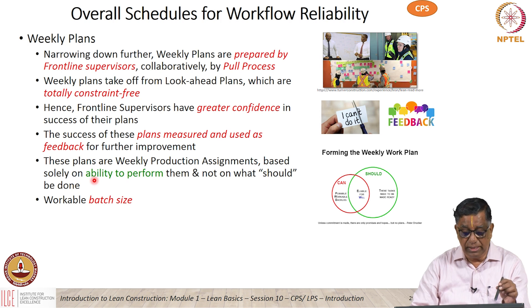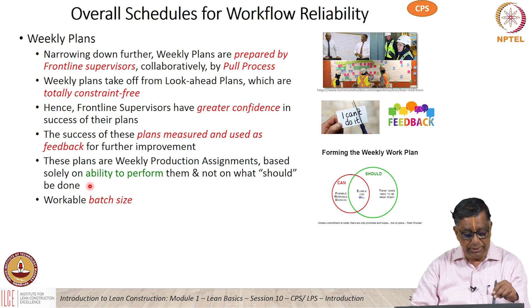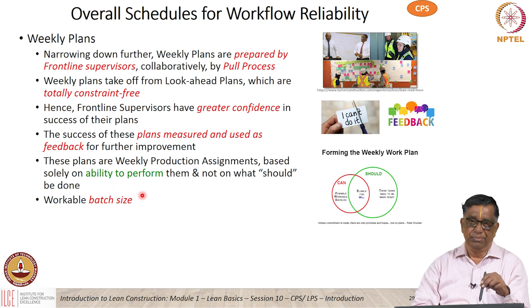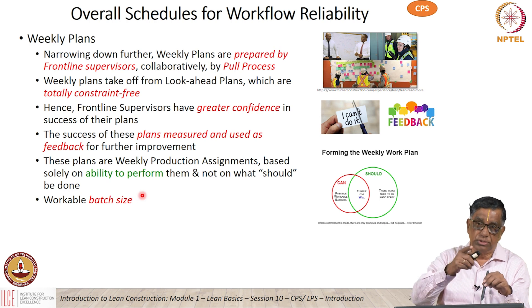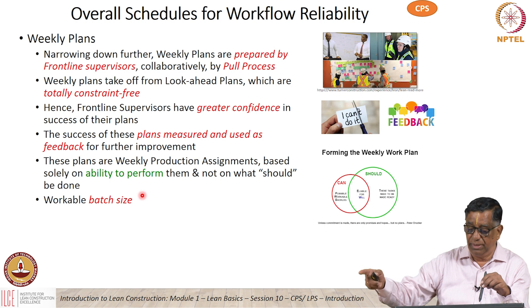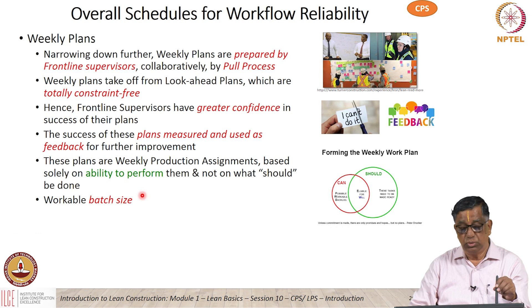Every single activity listed in the weekly planning has had all its constraints removed — that is the real thing. When you come to the weekly plans, they take off from the look-ahead plans, totally constraint free. All the frontline people can have great confidence that they can do that without any problem. We also look at the workability and the batch size — on a particular week, I will do so much concreting for the entire week, split between Saturday, Friday, Thursday and down to Monday. That is how the weekly plan gets done.